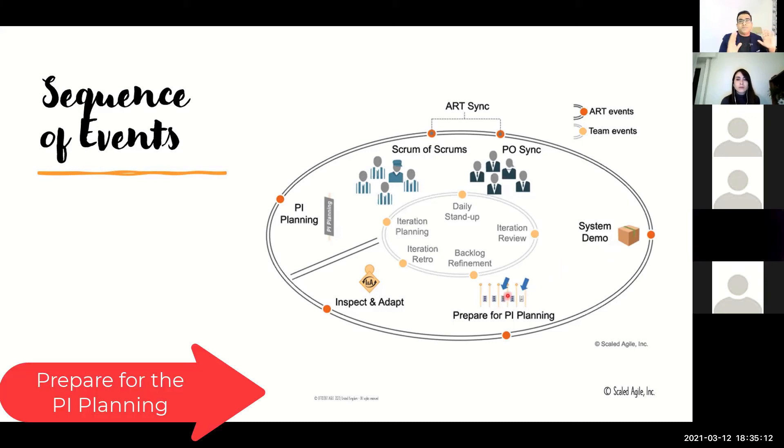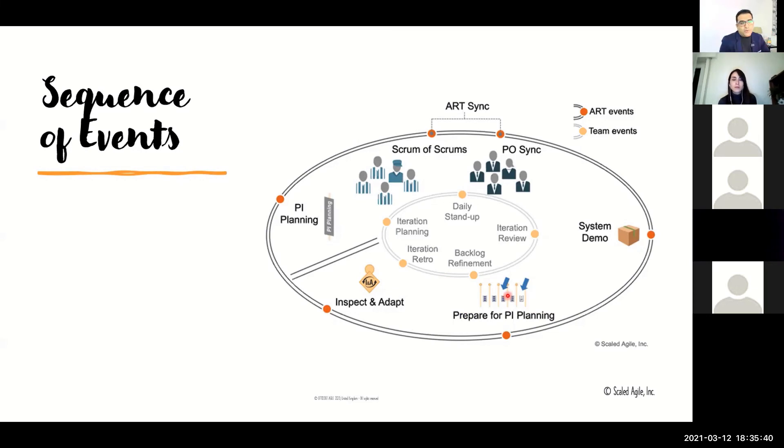Before you go into PI planning, if you're initiating this for the first time, I'd recommend you prepare your PI planning with solid preparation. Think about all the things you require before you start initiating a train. Have your backlog ready and refined, have all the team members, the train rosters, the RTE recognized, the scrum masters, product owners, who's going to be the architect. Get everything prepared before you actually launch a train.